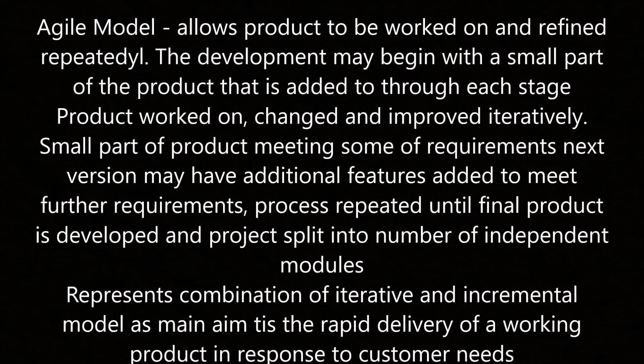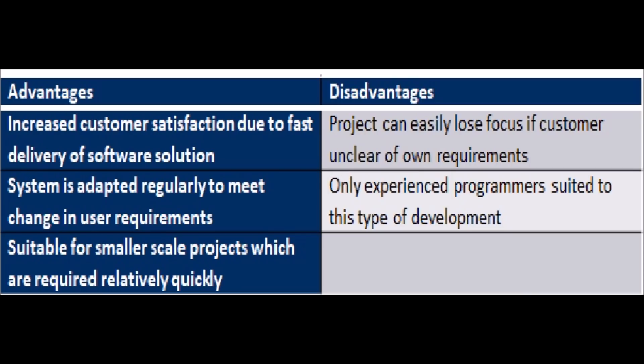The agile model allows a product to be worked on and refined repeatedly. The development team may be given a small part of the product that is added to at each stage. A small part of the product meeting some requirements is built first, and in the next version additional features may be added to meet further requirements. The project is repeated until the final product is developed and is split into a number of independent modules. This represents a combination of iterative and incremental models, with the main aim being to satisfy the rapid delivery of a working product in response to customer needs.